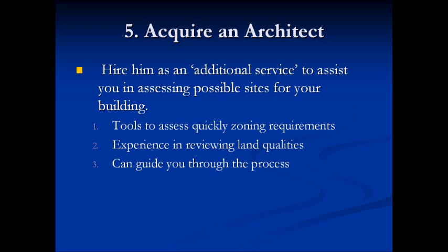So bringing on the architect as an additional service early on can help in assessing pieces of property. He can make recommendations as far as soil engineers are concerned to make sure that the bearing capacity of the soil will be able to handle the building, and also you'll be able to know on the front end how much money you're going to sink into the earth in order for the foundation to be able to hold the building that you want to build.